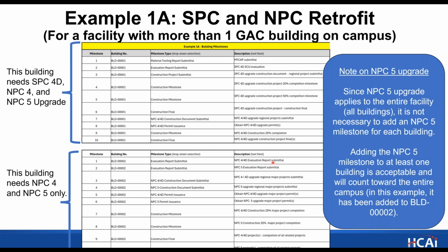That's the engineering analysis that comes to the seismic compliance unit. This one already had a deadline associated with it in the past. So hopefully that date that you submit will be in the past. And if it is, then in the status section where you select met or not met, you can put met if it's in the past and you have already done it.